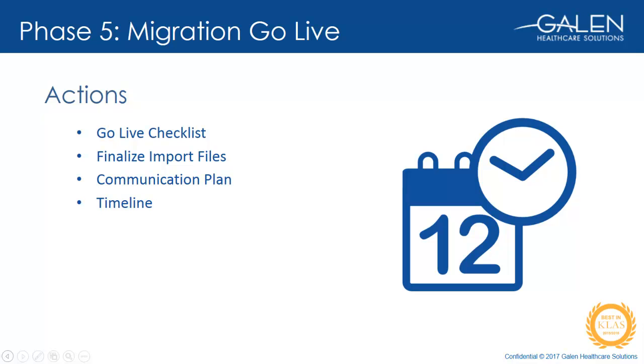So I just want to start off by saying that the way that we are presenting this information to you outlined in phases like this would suggest that each phase concludes before the next one begins, and that's certainly a true statement for many aspects of the projects where we have tasks, one project task dependent on the successful conclusion of another. But for go-live planning, it's not really a distinct phase. The go-live planning can start much earlier in the project timeline. Really, you could say even at the onset of the project, because as soon as the data migration begins with the client team, then the tracking of issues and decisions that will impact the go-live begin collecting as well.